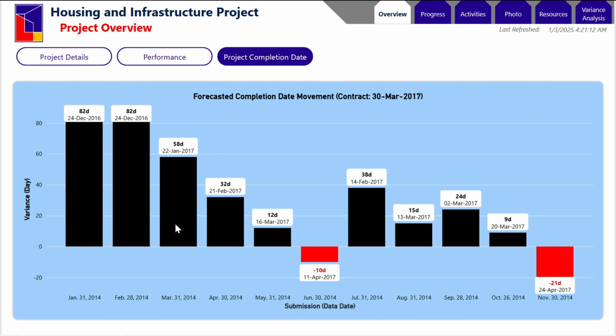By the way, the baseline of the schedule was approved about 8 months into the project. That's around August. That's something to bear in mind when we get to the part of the window analysis. So by the June update, the project fell to the negative territory, but it did recover by July.